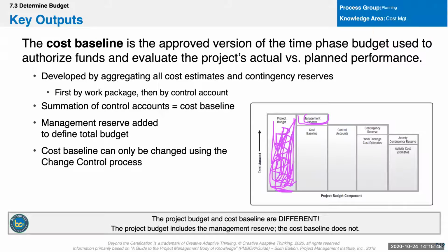Now, as we were going through this project, we estimated activities in the previous process. Then we said, let's do some reserve analysis because some of these activities have some risk. We might not do them right the first time. Some materials or supplies might not be right. So we'll do that. Then when we got to this process, each of those activities that had their risk reserves rolled up to some work package, maybe if you're having work packages. But if they didn't, after we added everything up together, we put money on top of that.